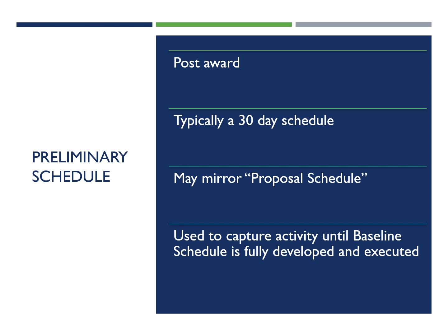It can mirror the proposal schedule, but just keep in mind that a prelim schedule doesn't have to meet or match the proposal schedule. Your client or owner is going to want it to, because that's what they awarded the contract based on. But it doesn't necessarily have to.